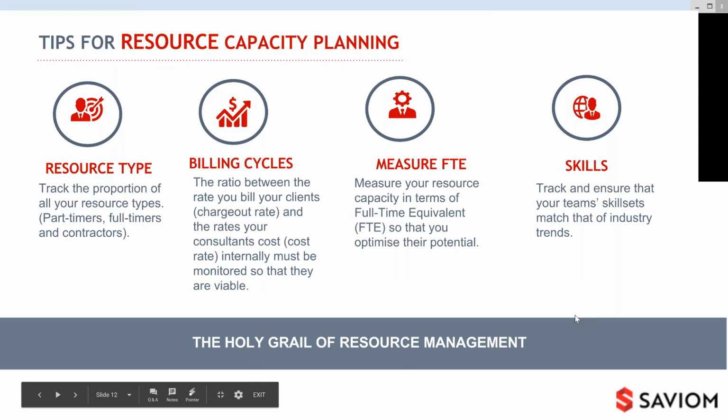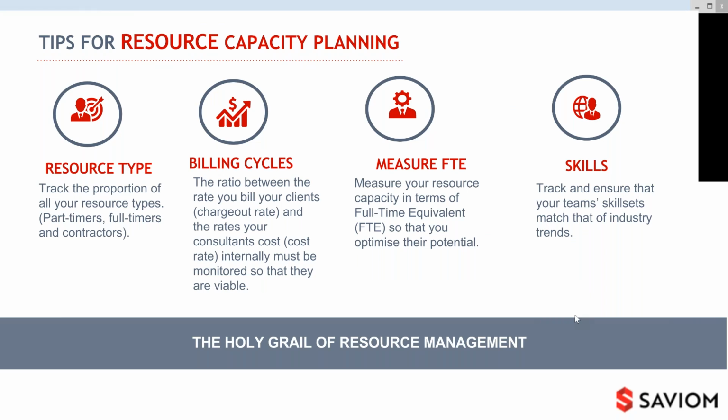Now, the final one is a measurement tip that I like to give: measure your capacity not always just by the number of people you have, but sometimes by FTE. FTE is one of the most valuable ways to measure your staff pool. As a recap for anyone not familiar with the term, FTE is your full-time equivalents, where you measure each staff member based on their work week. If someone's working full-time, they equal 1 FTE. If they're working part-time at only half, let's say 2.5 days in the week, they'll be equivalent to 0.5 FTE and so on.